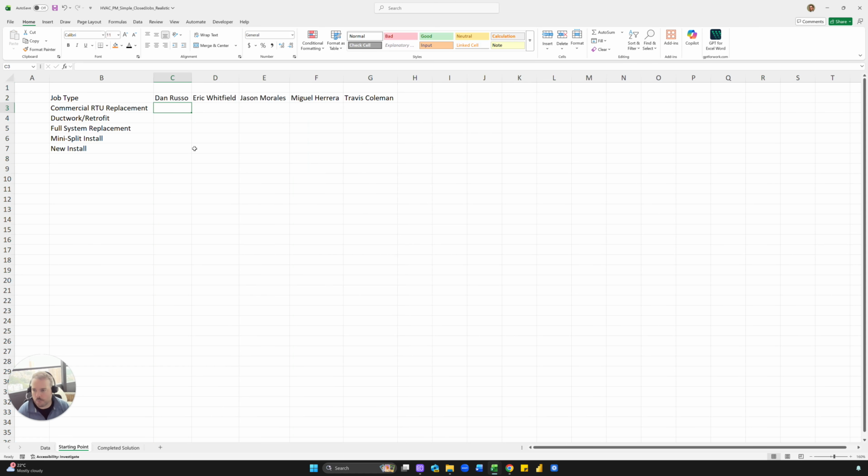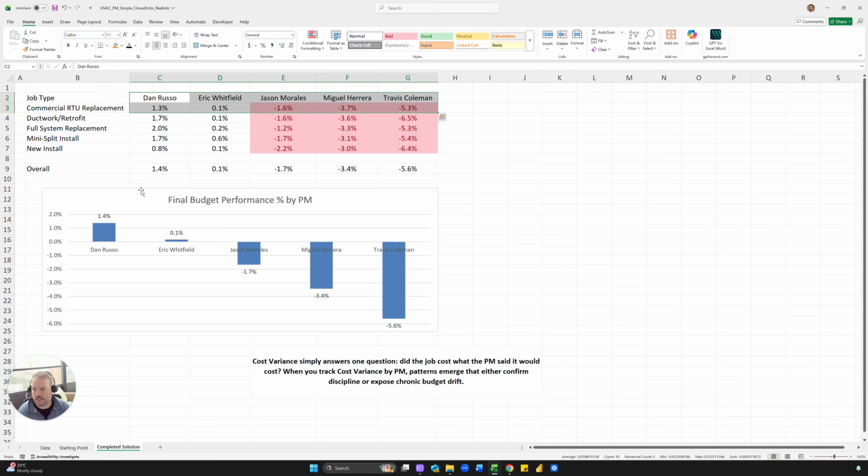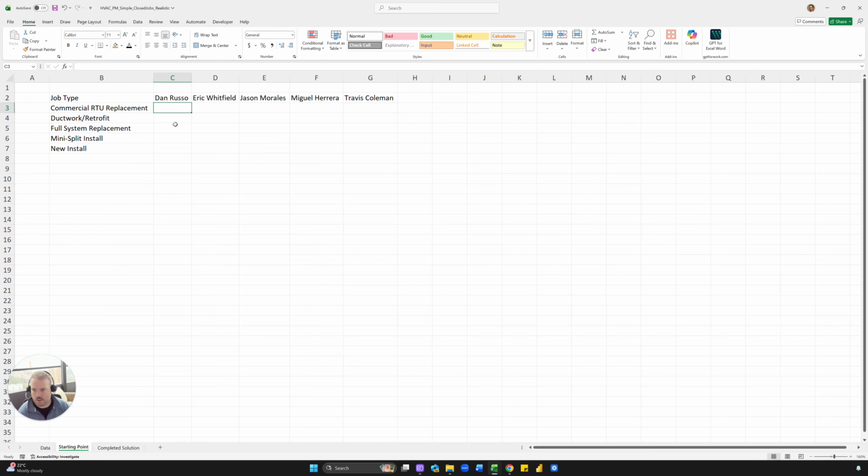Okay, and then for here, we want to find the sum of the variance column that we calculated for Dan Russo and commercial in the whole data set. And then we want to divide that by the final budget cost. Okay, so it's not as hard as it sounds. So to sum if Dan Russo and commercial and ductwork and full system, it's the SUMIFS function.